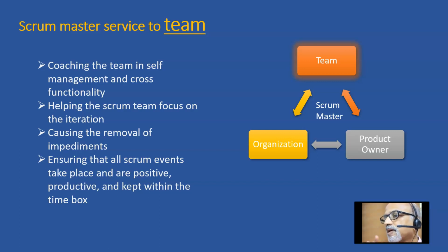If the sprint is planned for 30 days, it must get over in 30 days. Maybe you would not have completed the scope planned, but still on the 30th day, it is a hard stop for the sprint. So these things must be ensured by the Scrum Master. And continuous coaching to the team and orientation to senior management are part of the role of a Scrum Master. A Scrum Master who doesn't have conviction in Scrum is a big risk to the project.